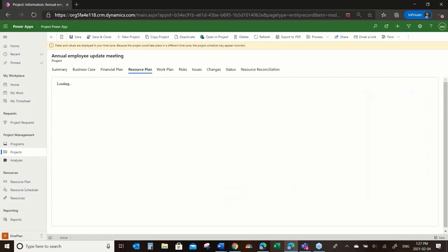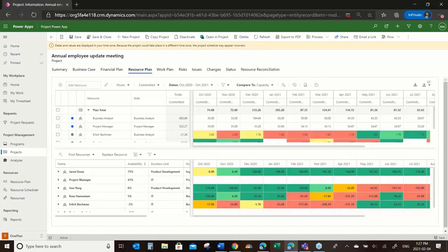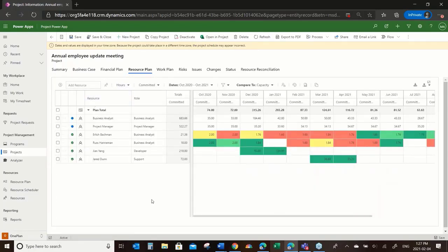Likewise, we've added some additional capabilities around resource planning. Now we can look at our resources in comparison to where they're being used in other projects. Let me turn this off for a second and look at my project team. Here you can see the resources that I have on the project, those marked with the little green check mark. They're active on my project, but wherever you see red, there's something there I might want to know, in that there is an overage. Ehrlich is over allocated in that particular month, and I might want to, as a PM, look into that in greater detail.